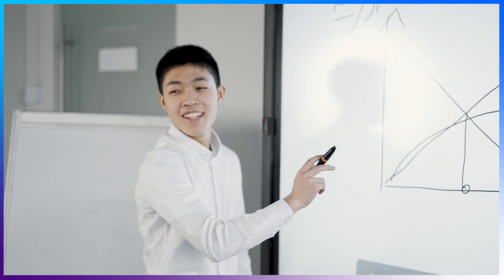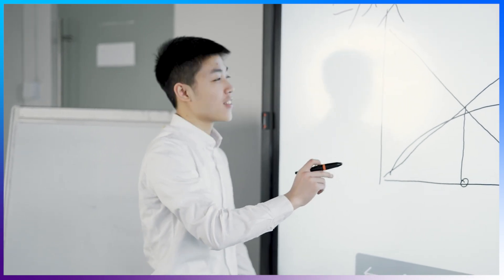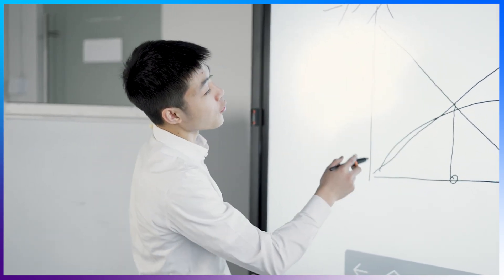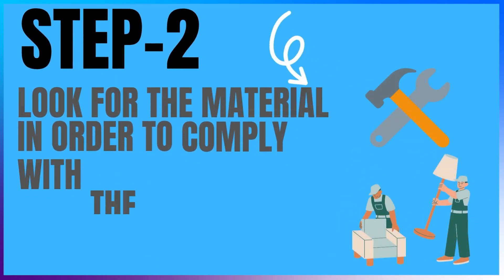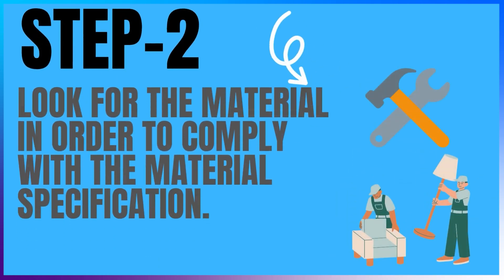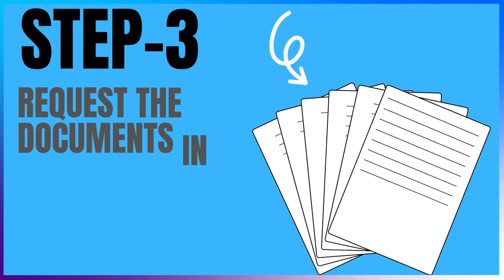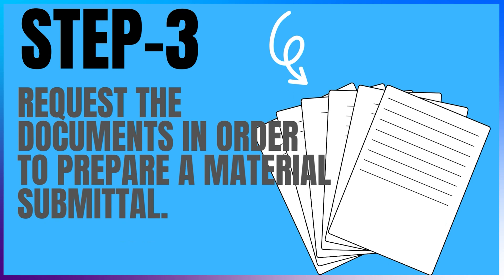How can it be prepared? It can be simplified into 6 steps. Step 1: Find the specification for the material. Step 2: Look for the material in order to comply with the material specification within your budget and availability in the local market. Step 3: Once the supplier or manufacturer is finalized, request the documents listed above in order to prepare the submittal document.